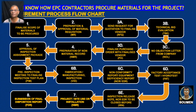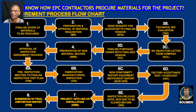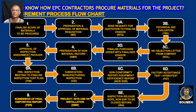The remaining large volume of materials are procured by the EPC contractor itself. When the scope is finalized — how much material the EPC contractor needs to purchase — after the Material Requisition (MR) is finalized, the contractor sends a Request for Quotation (RFQ) to different vendors. After the RFQ responses come in, technical bid evaluation takes place. Many vendors will quote for supplying materials, but the contractor checks their capacity and selects the best vendor — one that is economical and has the potential to supply the material.